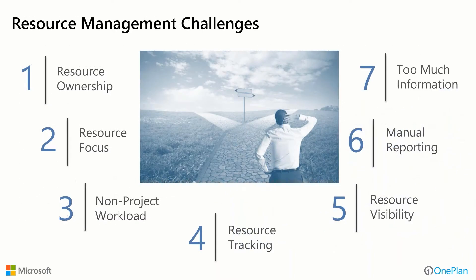What are some resource management challenges once you embark on this? One is resource ownership — there's always a matrix situation in many organizations where functional organizations own the resources, but the project management disciplines need those resources. The question is how do we get the right resources when they're managed in other areas? Another challenge is resource focus: work comes at us from all directions, and how do we know what to work on, or limit task switching so we don't have inefficient attention spread across everything?